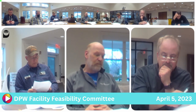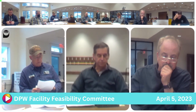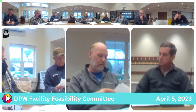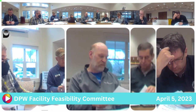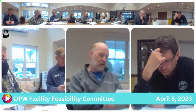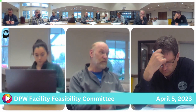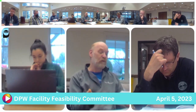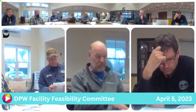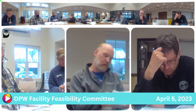Okay. And as I said, on the last page, sort of above the soft cost, is that escalation and design contingency. So there is a pretty hefty design, and we're calling it regional contingency, on the assumption that we're paying some sort of premium out here, and just the uncertainty of the design at this level. But then also there's 2 years of escalation in here.